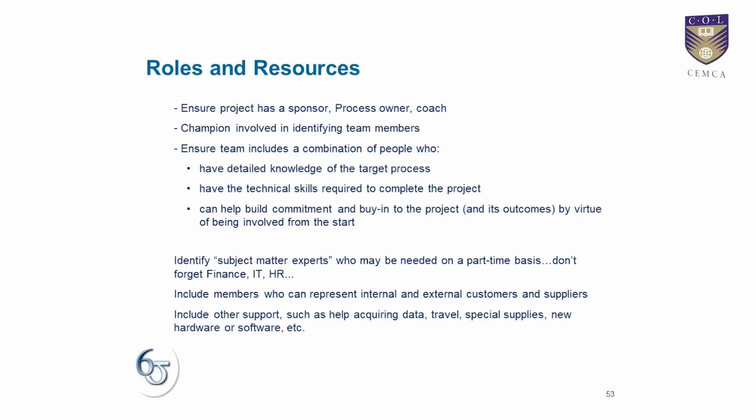Moving from the scoping, another element of the project charter, which is the roles and resources, or you can say the project team. Now, project team here is again extremely important, because these are the people who are going to work on a project. Project team typically has a project sponsor who will assign the resources, allocate the budget, remove any challenges, will provide support wherever required. We'll have a project process owner or a project leader, and there will be a few members who will work with the project leader to carry out the project activities.